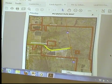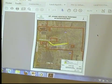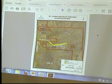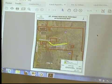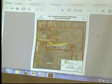What I'd like to say in closing, before I open it up for questions, is that the city is expected to build the road in roughly 6 months. And so you have the FDOT, who has 15 to 18 months to build. Our project timeline is about 6 months. So we have about 12 months of slack, if you will. We have to have our road open when they open their interchange. If we get done early, that's fine. But this is the 18 months of DOT. This is us in the 6 months. So we have the ability to slide it forward and backwards.